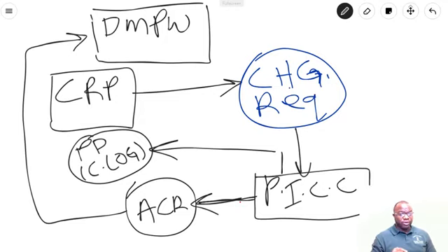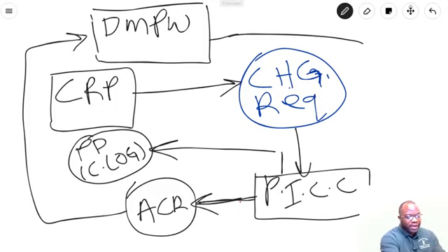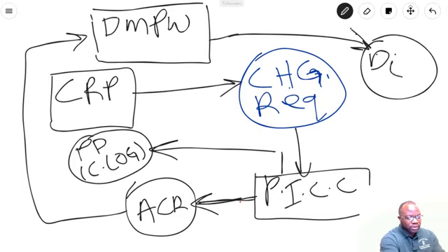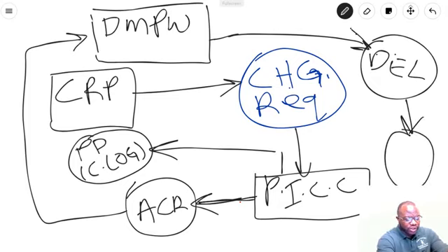And as it's executed upon, you're going to get an output known as deliverables, which are called DEL, okay? And those deliverables need to be checked. Now that you've carried out that approved change request, these deliverables need to be checked. You know where they need to be checked? Control quality. So, I told you it was a long journey. Control quality. But that's not where the story ends.